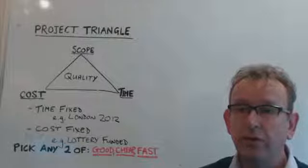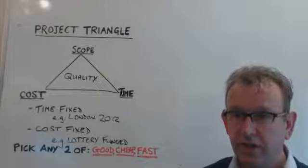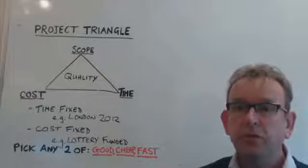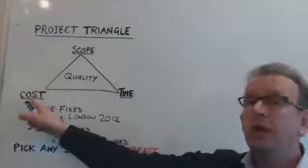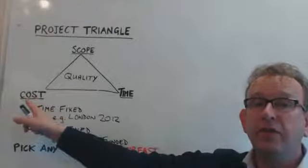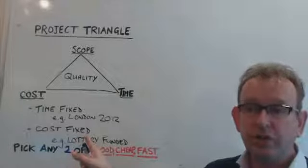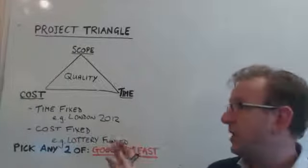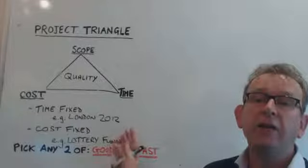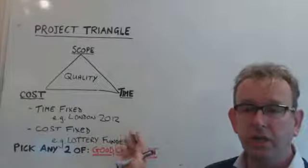So these three elements are the three primary constraints which every project faces. It's important to recognize that on every project at least one of these sides is fixed. For example, many projects are fixed by cost — such as lottery-funded projects, where the project is given a grant and must deliver within that budget no matter what happens.